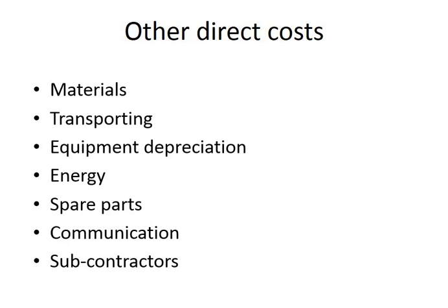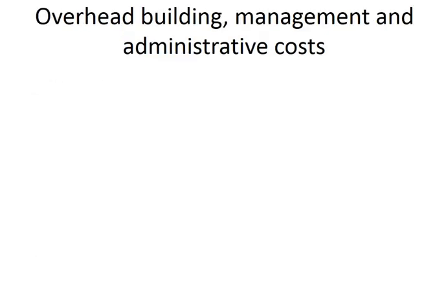But there's another level. Okay? Often you need to pay the administration costs. I mean, let's say that you are building something and you need an office to manage everything. So you need an office for the managers, engineers, and so on.